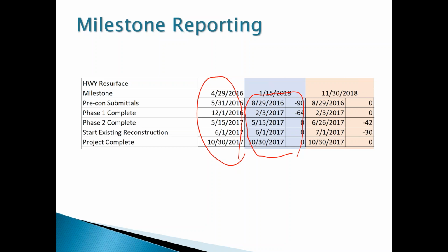So I can tell just by looking at this spreadsheet of a PDF schedule that the schedule is being manipulated to still show finishing on time, when in reality there's been either lack of production or some other types of delays, whatever it is. But that's entering into what I call project creep, where you're squeezing time out of the end, and you can only do that so much.